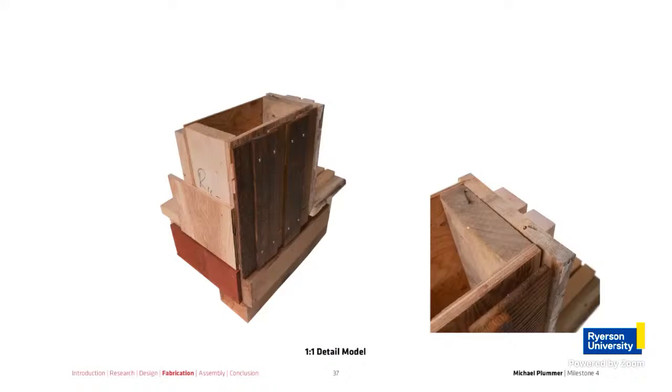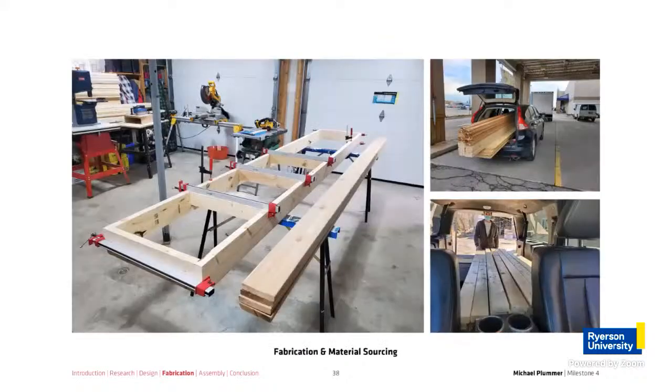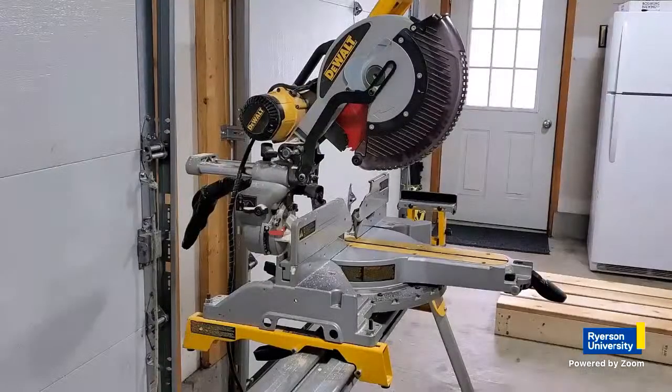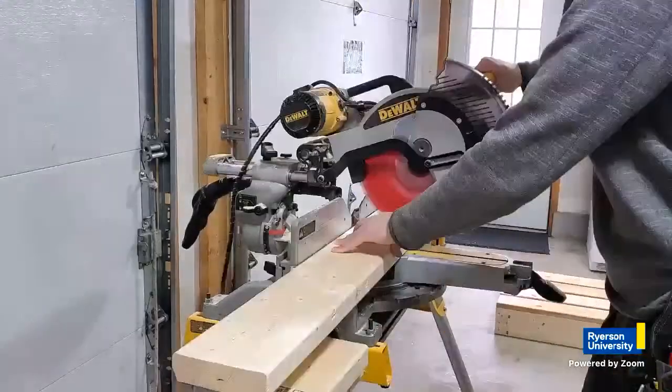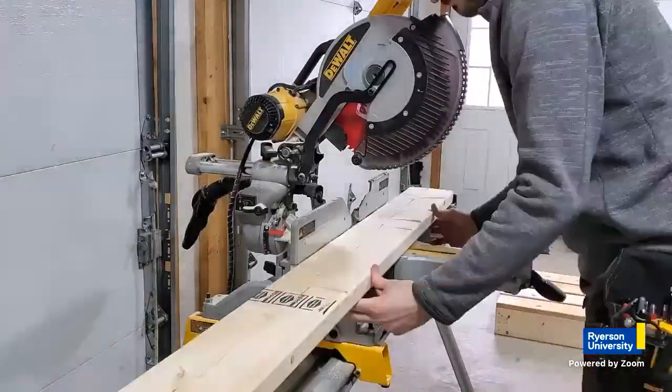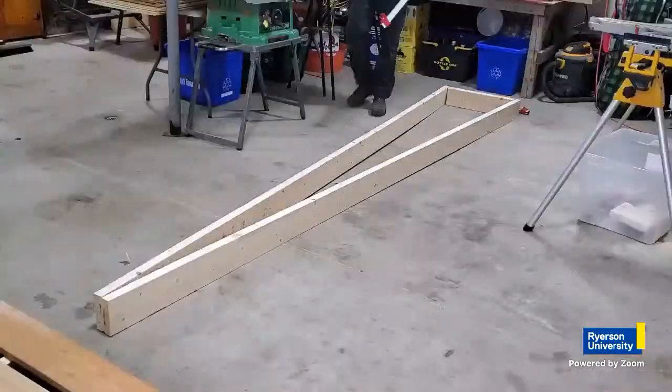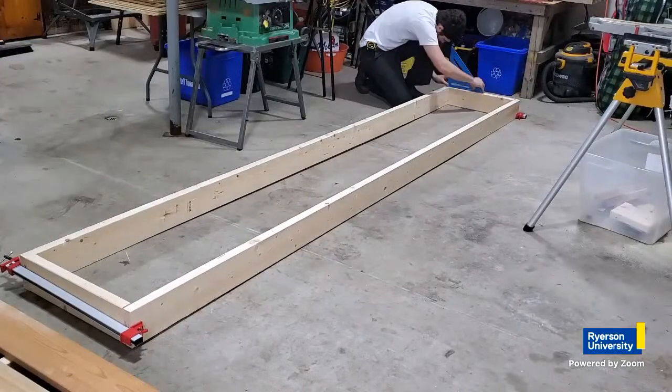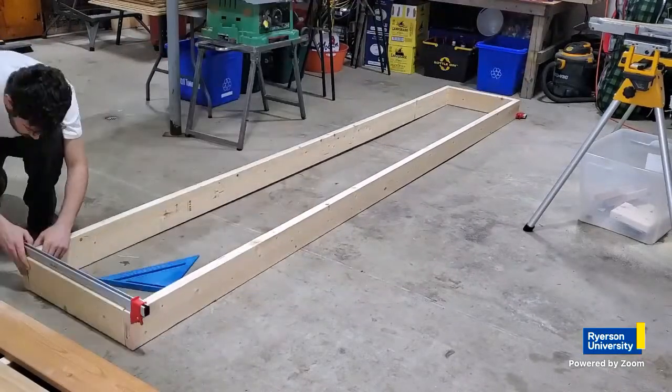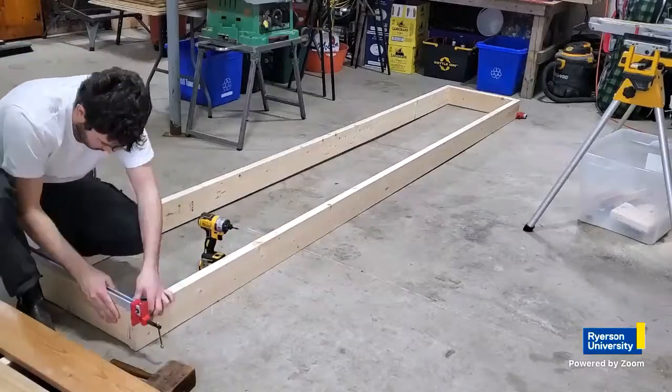The design build project was a valuable opportunity to test the aspects of this thesis that involve the physical sourcing, fabrication, and assembly of wood building materials. The initially assumed ubiquity of standardized lumber in the consumer marketplace was not exactly correct. In reality, the market for lumber fluctuates based on seasonal supply and demand. This was exacerbated by COVID-19 and the sudden increase in demand for home improvement products and materials.